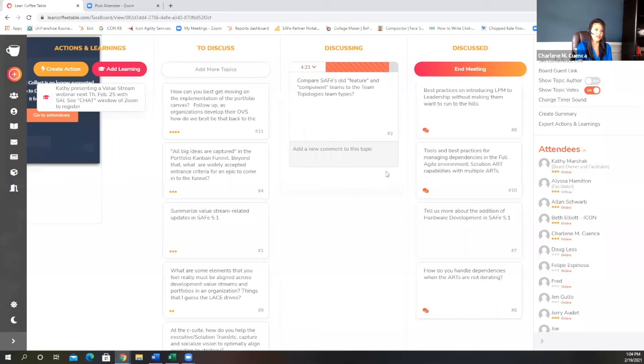And I think when we start looking at some of the other thought leadership that's been introduced into SAFe 5.0, we start looking at Team Topologies, which gives us a bit more variation and options on other teams we could introduce into the ecosystem for our trains, right? So we talked previously about what we're optimizing for. We're always making trade-offs, right? We can have teams that are all feature-centric, but we might not have enough skill set to really make that happen in the early days. So we may need a balance of component teams to get us started, because maybe we are limited with the amount of people that we have that know some of those domains. Over time, we try to make sure that we have the right balance between feature teams and component teams.